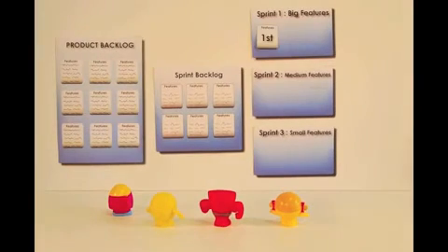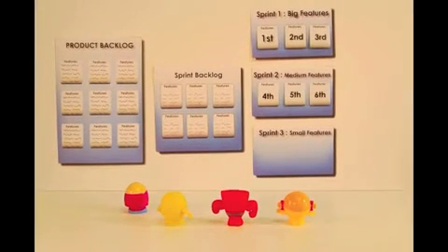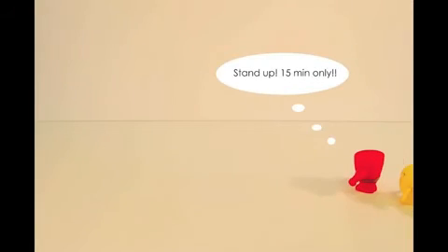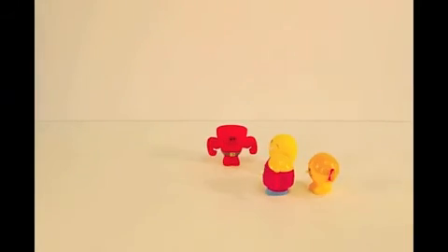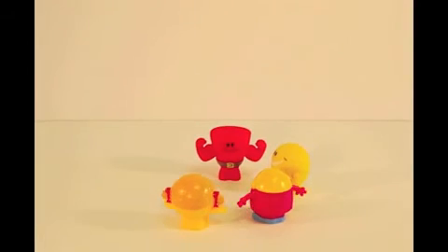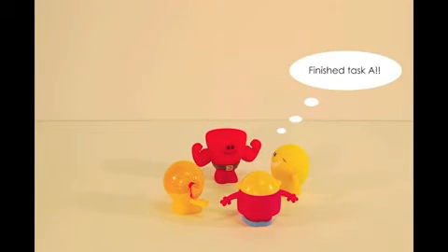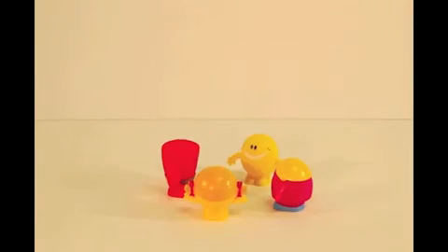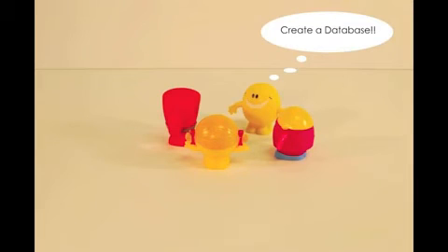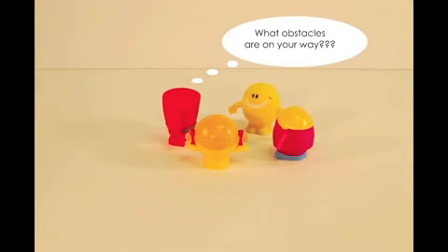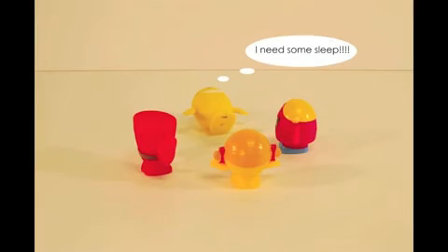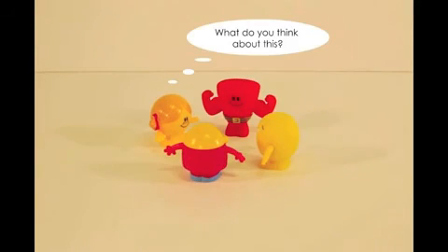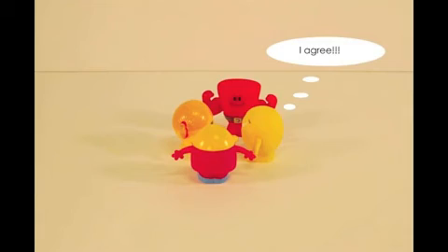The Scrum Master is the person responsible for keeping track of all the tasks. He or she keeps track during the daily Scrum. The daily Scrum is a 15-minute meeting that is set up every day in the same place at the same time. Some companies prefer to call it a stand-up meeting because they do it standing up to make sure it won't last more than 15 minutes. During this meeting, the Scrum Master finds out if everything is running smoothly. He also finds out if there are any team difficulties and keeps track of all the work that has been done. These 15 minutes are also a time for the team to exchange new ideas.